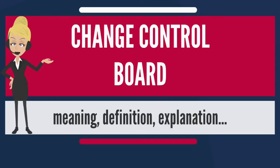The decision of acceptance of the changes also depends upon the stage or phase of the project. The main objective of CCB or SCCB is to ensure acceptance of the project deliverable by the client. A typical change control board consists of the development manager, the test lead, and a product manager. In few cases, client representation is also done in CCB to ensure the acceptance of the deliverable.